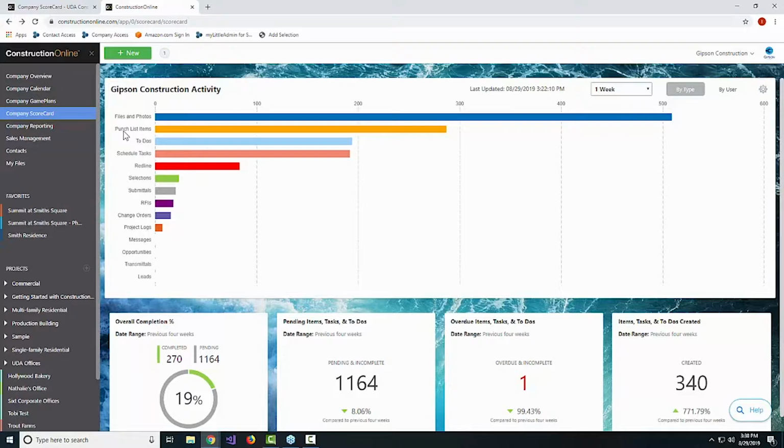If you see a pretty big increase over and above that, it might indicate that we're seeing a little bit of slip in quality assurance. It may be that the quality of someone's work, the standard, has dropped a little bit, or you've got a new team member or new trade partner that you're working with, and that's resulting in a higher number of quality items or punch list items entered there.